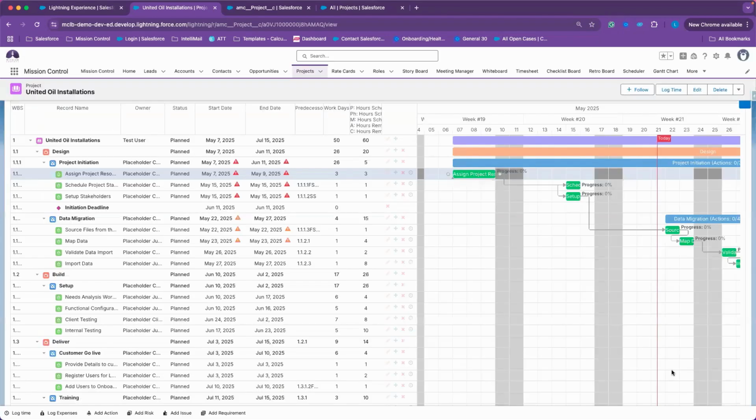If you are using your own progression values on your project, you can choose to override how the completion percentage is determined by using the progress bar. So I can drag and drop progress on my task from here. Now, once I override the completion percentage by doing that, I will have to continue to manage it manually as such.